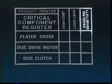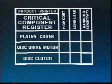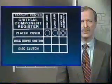handling sensitivity. The analysis shows that the quality planners have identified eight criticalities with respect to the platen cover, including three criticalities shown here. A more detailed analysis of the platen cover and other components and assemblies is then carried out, showing the action plan to respond to the several types of criticality and indicating responsibility for the actions. For example, with respect to long lead time, commercial operations will monitor the tool schedule for progress.